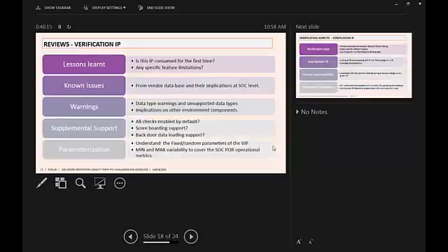Okay, the next thing is about the reviews. We can plan this in the early stage of the project, reviews with the vendor. There are some things they may not share, such as future limitations, but still we can ask whether this IP is being consumed for the first time, whether this is the first deliverable we are receiving, or whether other clients have it for this particular VAP. And does it have any future limitation? They would probably have planned to add that feature in forthcoming releases. But we have to make sure those future limitations do not affect our milestones.